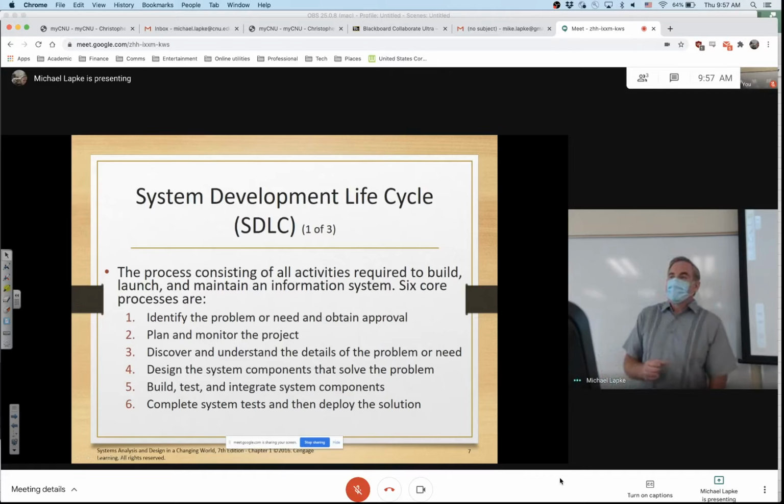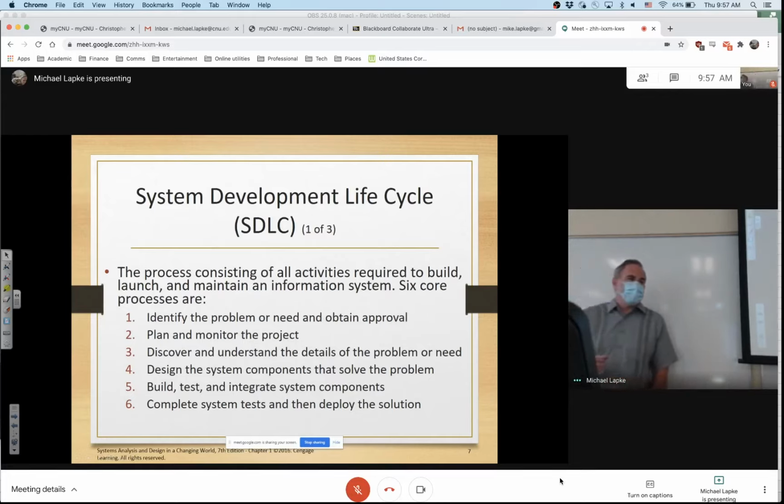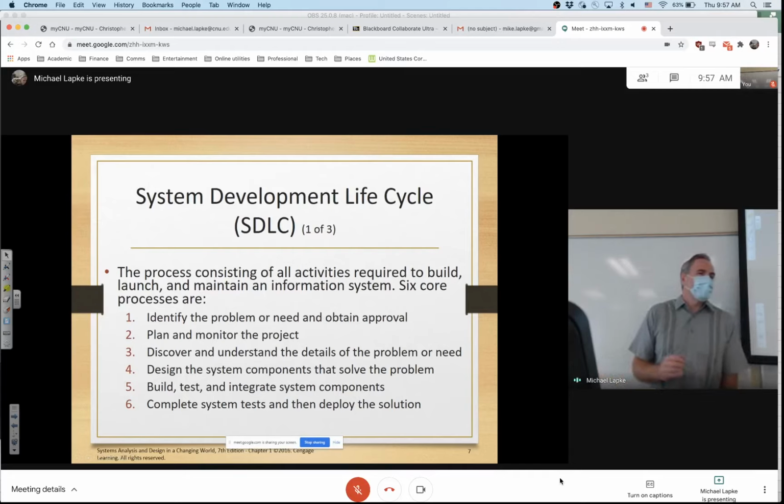Funny story, in the early 2000s, they thought it would be cool to, and I say cool in like that's actually what they said, they said it would be cool to move away from this antiquated mainframe-based system into a client-server architecture using Java. Wouldn't we be so techie if we did that? And everyone said, yeah, we would. So they invested about $1 billion, with a B, to migrate their system over to this client-server architecture, Java, and they never got it working right. So then they went back to the old system.